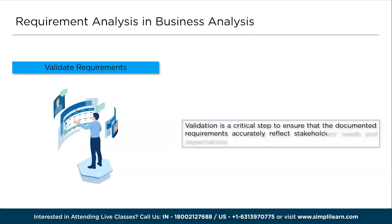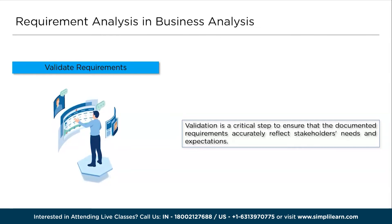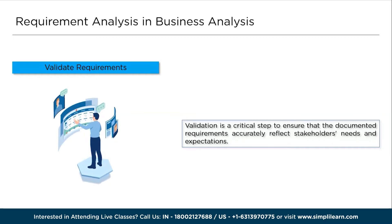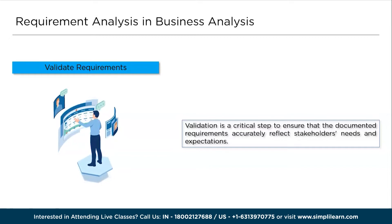Step 6: Manage Requirements. Requirements are dynamic and subject to change throughout the project life cycle. Establish a robust requirements management process to handle changes effectively. Implement change control mechanisms to assess the impact of requirement changes and ensure they are properly documented, communicated, and approved. Regularly review and update requirements as the project progresses.